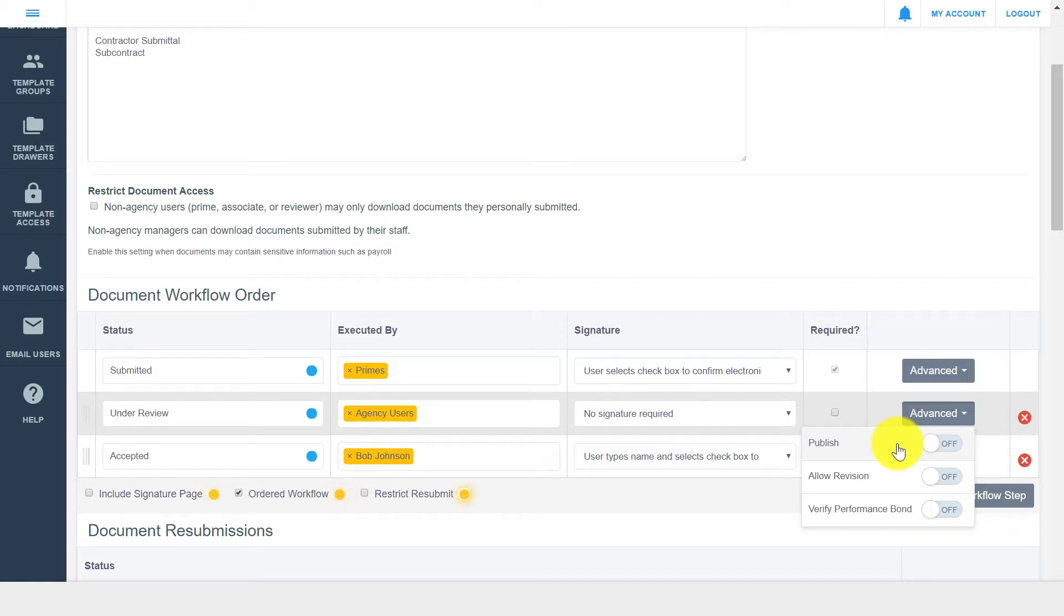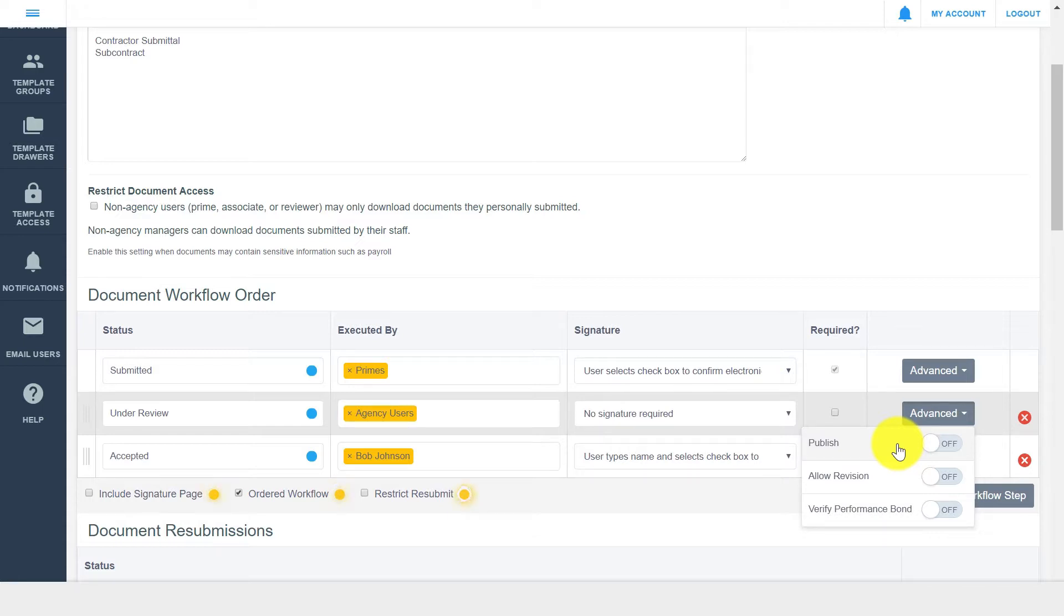As an example, if you were working in an internal-only drawer and utilized this option, documents could be copied to another drawer that contractors could access, but they couldn't see any of the audit trail activity from the original drawer or document.